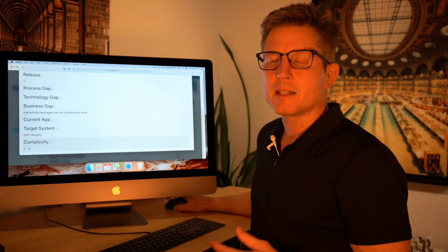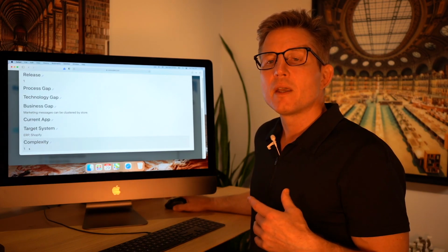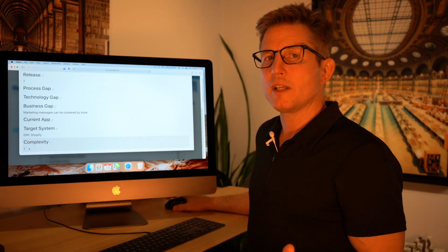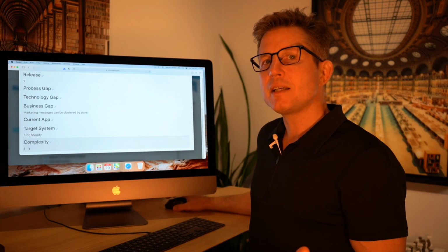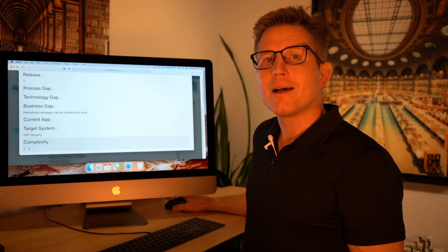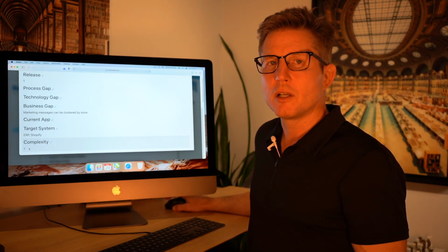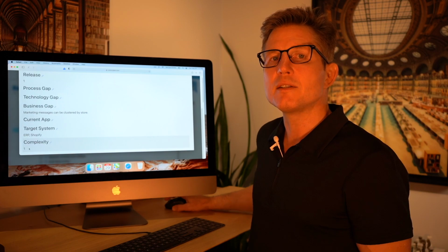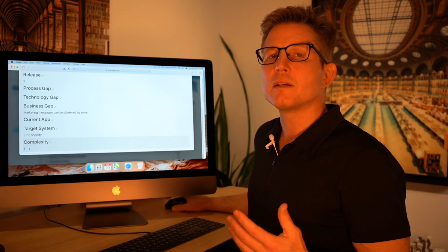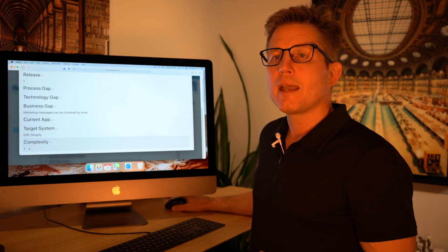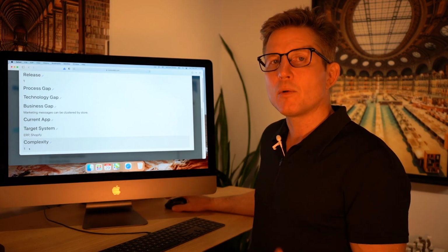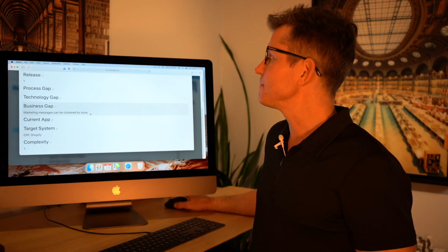How do you set the complexity? Well, it is based on subjective information, not only objective. Subjectively, you'll want to assign something higher if you have less information or you've collected less input into your estimation. You'll set a higher complexity, and then once this requirement is more known and you are comfortable with the systems, you can lower the complexity, and then that will impact the outcome of your estimation.